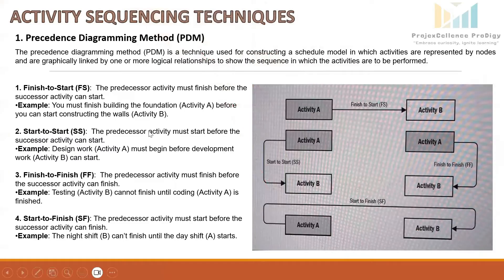The Precedence Diagramming Method is a technique used for constructing a schedule model in which activities are represented by nodes and are graphically linked by one or more logical relationships to show the sequence in which the activities are performed. It is also called the AON technique — Activity on Nodes. In PDM, there are four types of dependencies or logical relationships between activities.